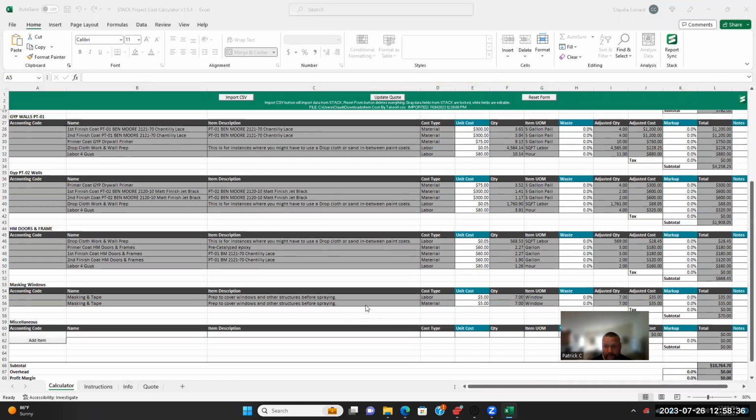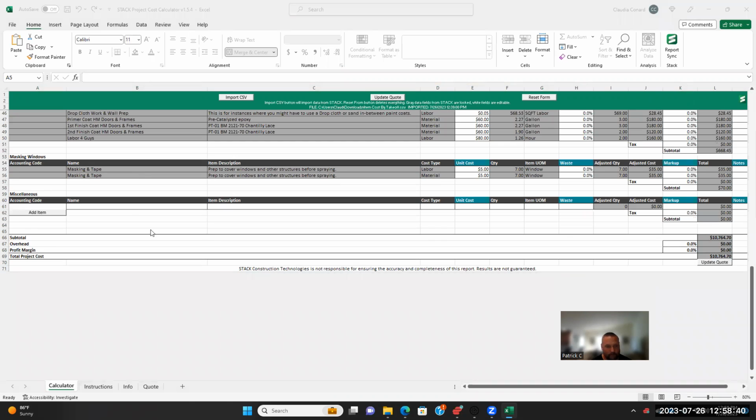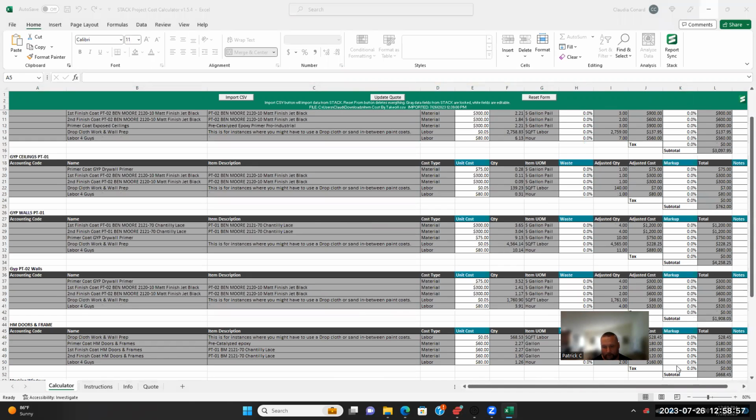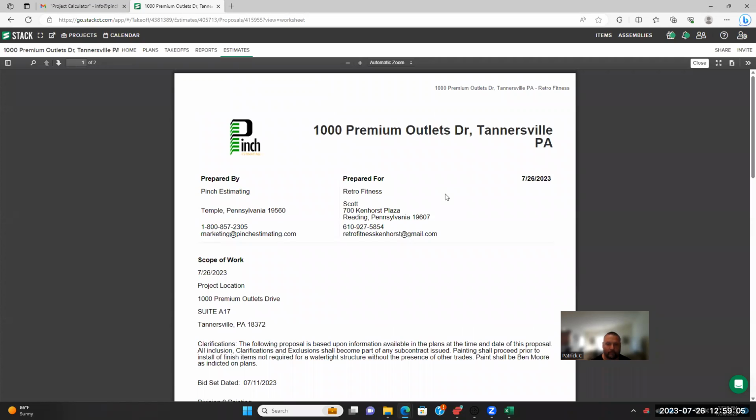And that would be your extended cost, meaning the total cost. Of course, we didn't put on the scissor lift and the material tax. You would put that on, and then that would give you like another $1,500 on here or something, $1,200. But your extended cost is here. This is your budget. You would use this as your budget, and your bid proposal would be the actual selling price of the job.